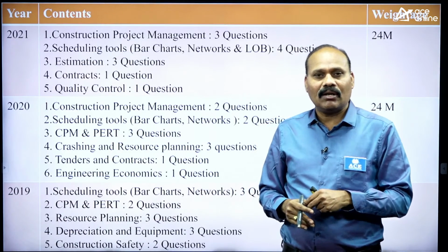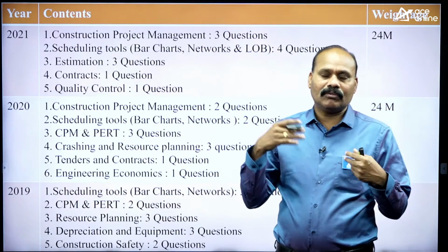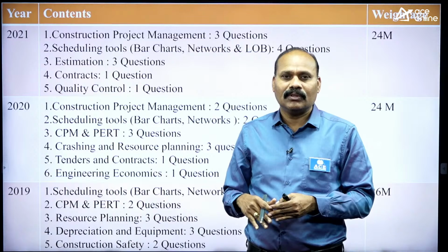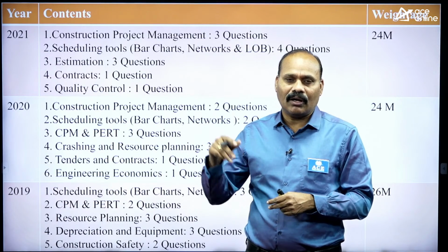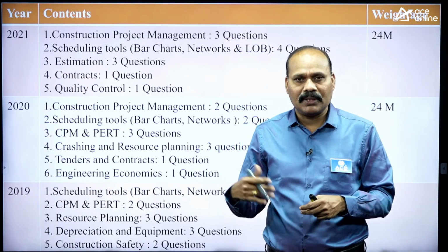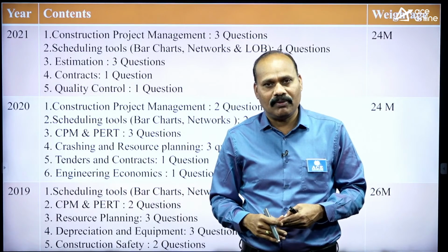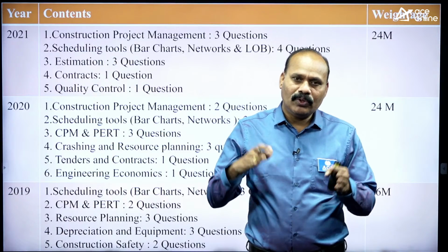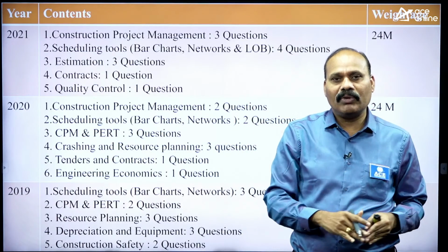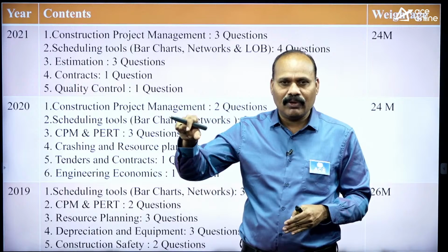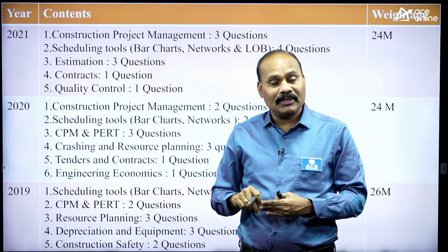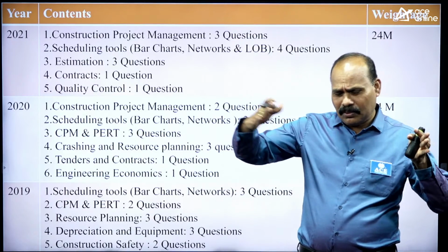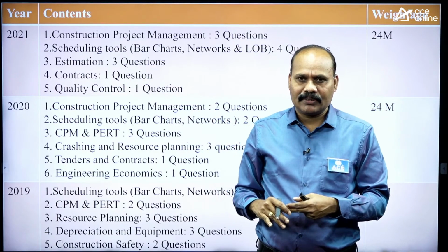Again, measurement based contracts can be classified into item rate or maybe unit rate, percentage rate, or cost plus percentage, or cost plus fixed fee, or cost plus variable fee, or even special type of contracts. One contract is meant for materials procurement, one is meant for annual maintenance and maybe service, and one is meant for human resources. So those are actually special type of contracts.